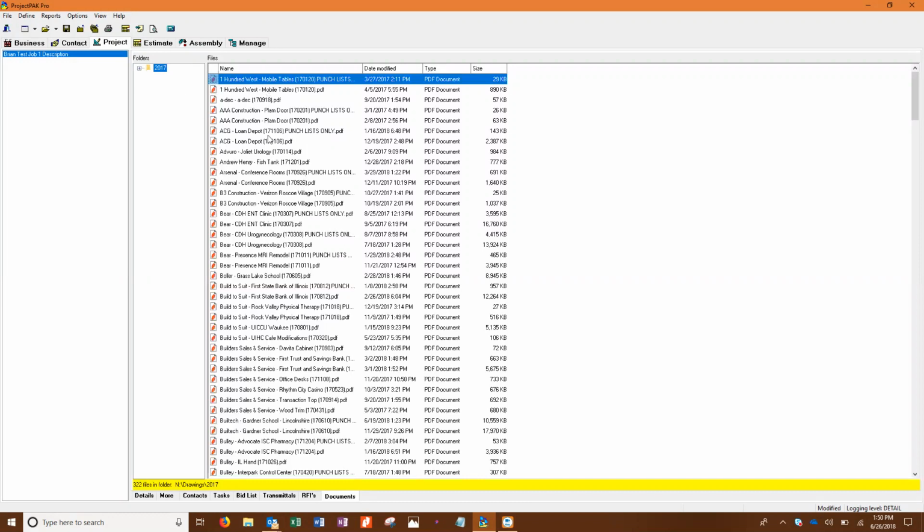But what's cool about this is that if you had multiple things, you had the drawings, you send out an actual quote to them, and you save it as a PDF, you can stick it in that folder because you probably did anyway. In the past, we would have scanned it and stuck it in there, right? So now you're going to stick it there so that you know exactly what that last thing was that you sent to them. Because what if something happened and someone changed it and now they sign it and it doesn't even look the same? You're like, what happened here?